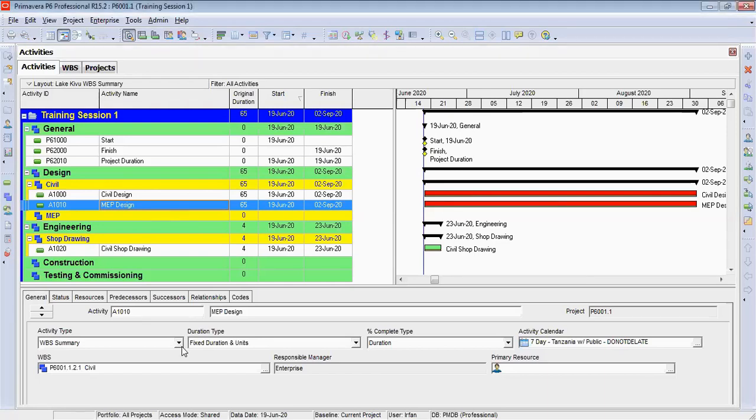And when you select the activity type as resource dependent, it will consider the timing from the resource and be based on the resource calendar assigned. And sometimes if you are related to civil works, then you know that some periods are not good for doing soft escaping. So for soft escaping activities, we switch the activities and we can make them resource loaded, and these will only be done at the suitable time.